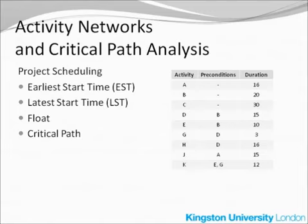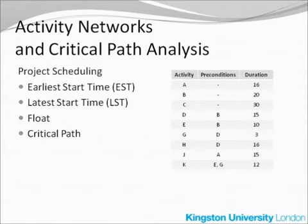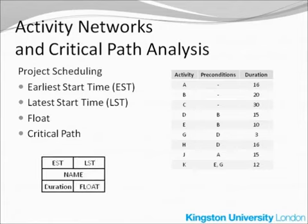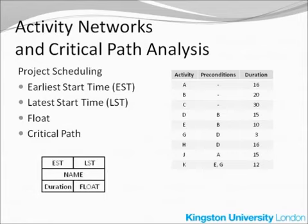One more piece of information in this table is the duration for each activity. This table will be used directly to create the activity network, in which every activity will be shown in the form of a node. For every node, you put its name or label, and four pieces of information: the duration in the lower left-hand corner, then going clockwise, EST — the earliest start time, LST — the latest start time, and finally float.